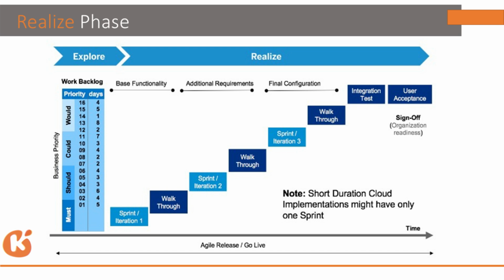Whatever feedback they give, you can incorporate in the next iteration. So first is completed, everything is fine. Now moving to the second iteration. During the second iteration, you will take that client feedback and incorporate it. Like that, you can complete within the 3 iterations. So whatever requirements you have, say 12 requirements, you will bifurcate into 4 requirements in the first iteration, 4 requirements in the second iteration, and the remaining 4 in the third iteration, so that it will be completed.